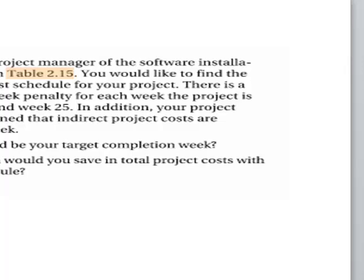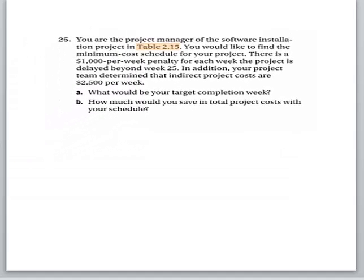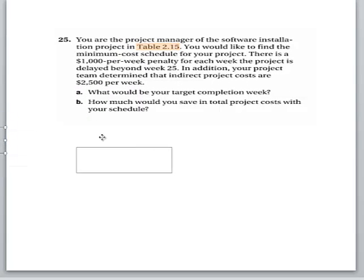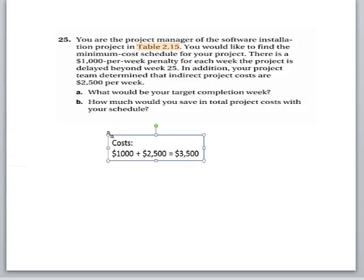This basically indicates that you have to crash. Then it says how much would you save in total project cost. So your total costs are $1,000 plus $2,500, which is $3,500.